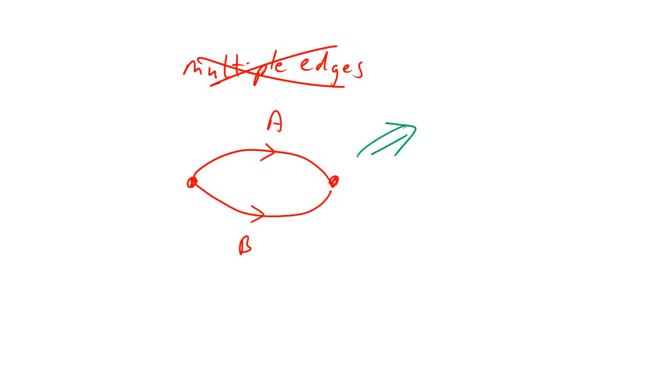Option one is we go like this, and then we go, this is activity A, we don't do anything with activity B, we just leave activity B alone. And then we do a dot like this, and we call this a dummy. Now, sometimes it's just a little d. They don't write the whole word dummy. It's kind of sometimes hard to put in the graph.